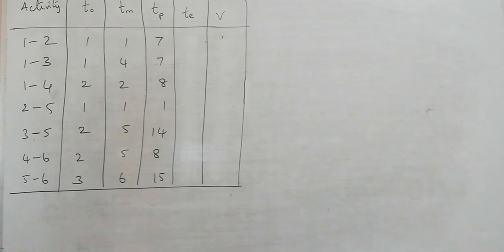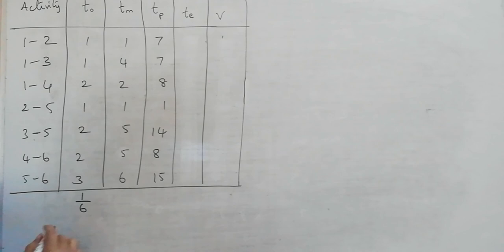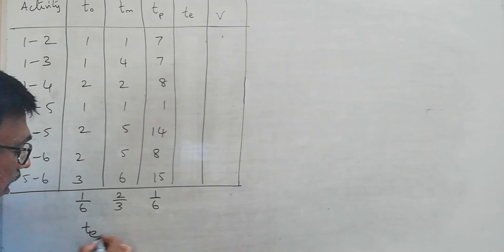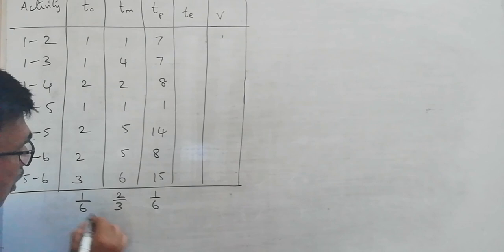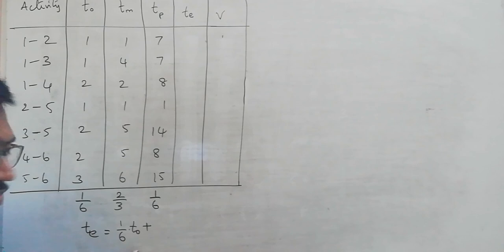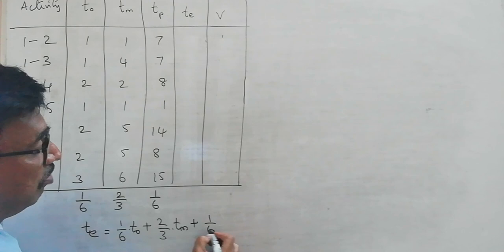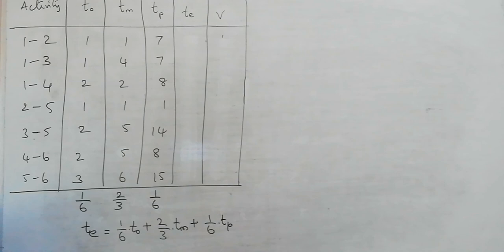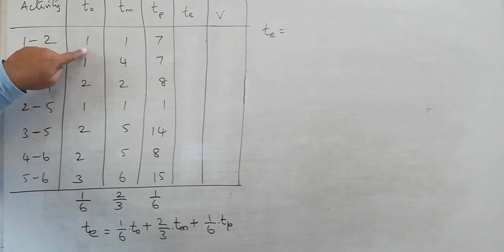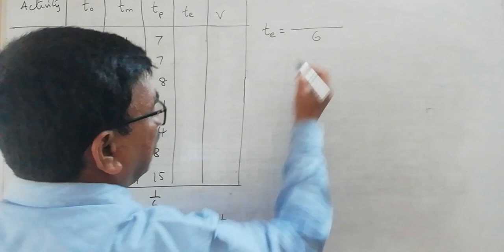Since these three time estimates are not certain, we assign probabilities: 1/6 each for optimistic and pessimistic time, and 2/3 for most likely time. The expected duration of each activity is then: (1/6)×T0 + (2/3)×TM + (1/6)×TP. Taking LCM of 6, this simplifies to: (T0 + 4×TM + TP) / 6.